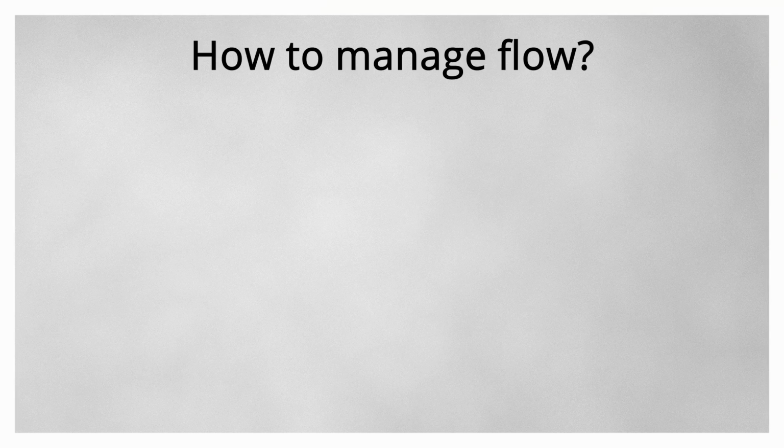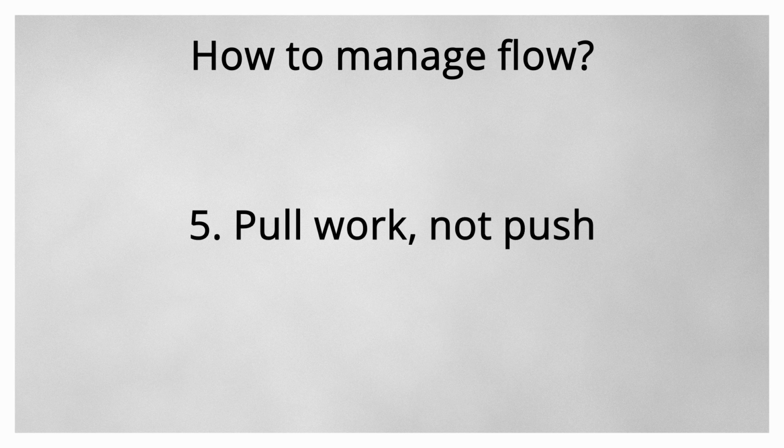The other way to manage flow is to ensure that you're pulling work and not pushing work in. So we want to finish, not start, right? If you have a visual board, a Kanban board, we look at what's on the right to see what we can do to move stuff to done. Then we start looking from the right first and go towards the left. Pull, we're going to pull, okay?